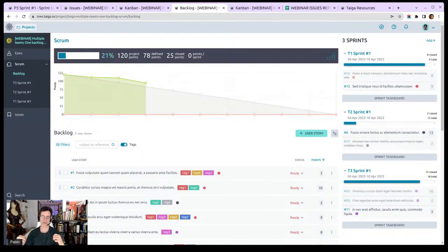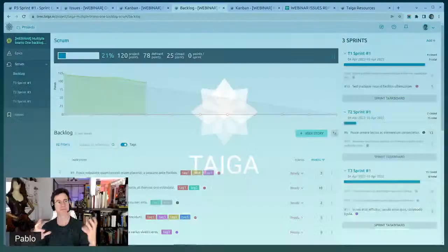And so this would be, I give you an example. So you have a team of 15 people, and it's just one project, but you have the team that will do research, user experience, and visual design, and will reach a conclusion where the user story can be developed. Then you have the team that takes that and develops it, and then perhaps you have a team that does testing. Now, the way I just phrased this sounds a bit like a waterfall model, right? Like you have some sort of handoffs, but that's only in appearance.